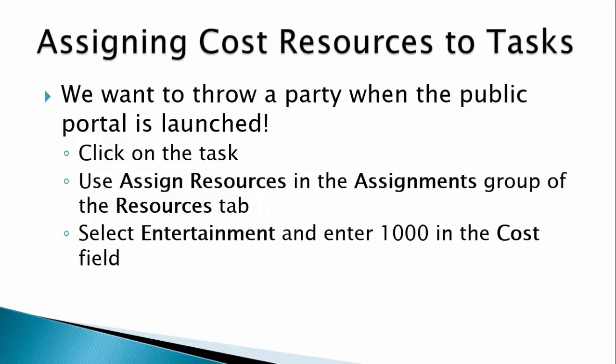Using Assign Resources in the Assignments group of the Resources tab, select and assign Entertainment. The cost column, normally computed for work resources, is blank. Go ahead and enter $1,000 in that cell, the budget for the party.